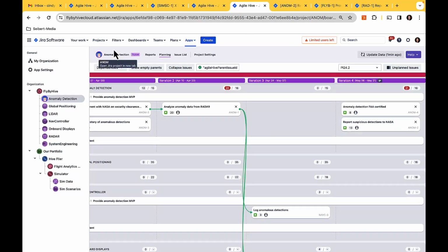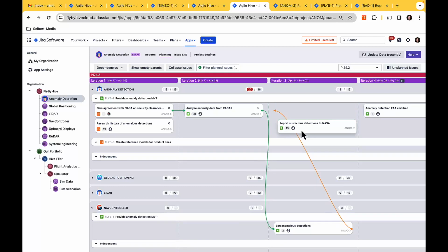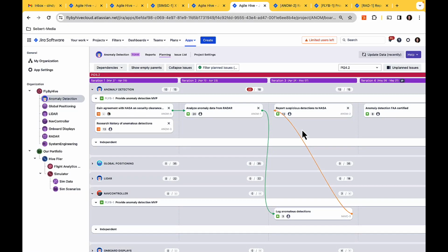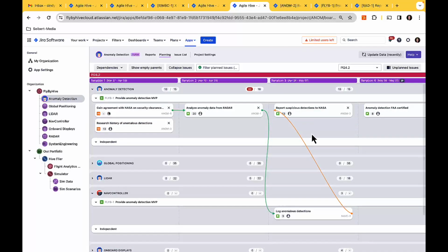Now when I go back to the planning board, I see that dependency. And in fact, if I would really like to move that work forward, I see that it could cause a risky dependency. So these are the ways that we use the planning board to help us collaborate between teams, plan and sequence our own work. We can also see the loads and capacities on other teams, which is particularly helpful when our team doesn't have enough capacity to complete something, and the teams themselves can collaborate with one another if there's a possibility to share work.